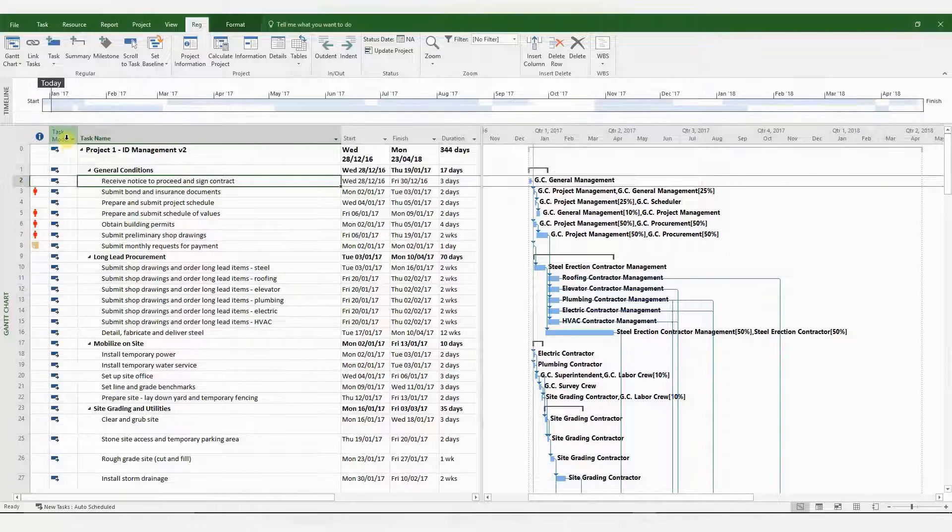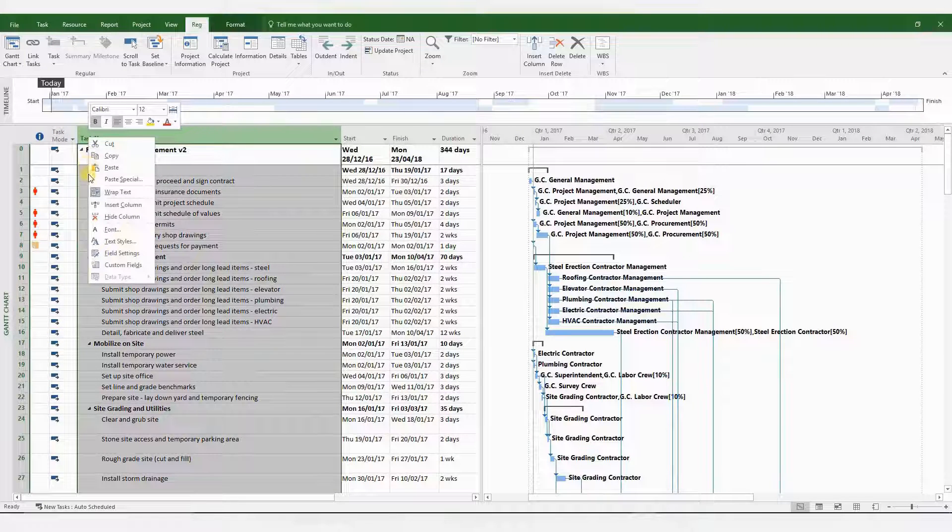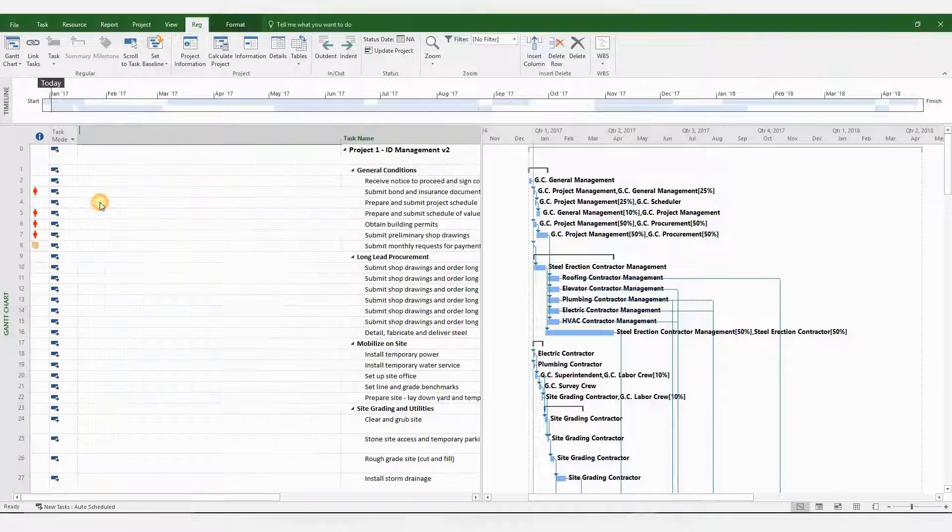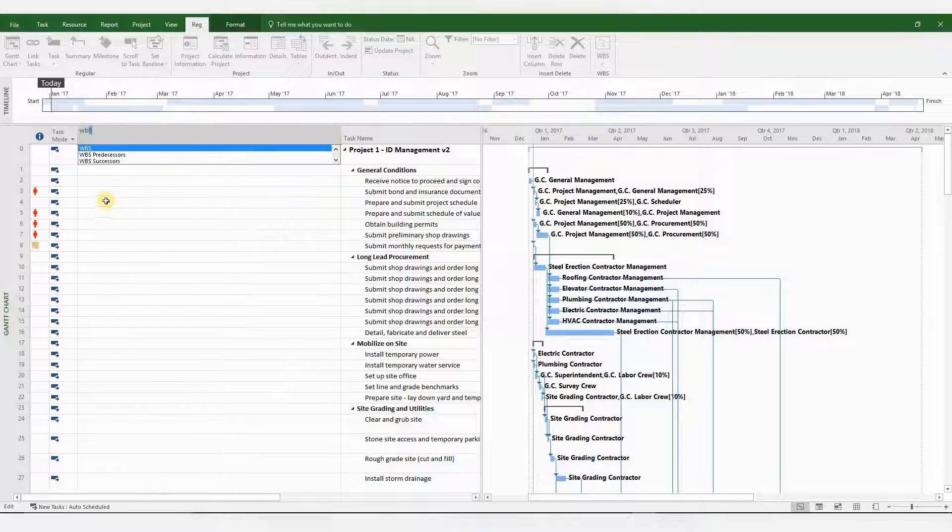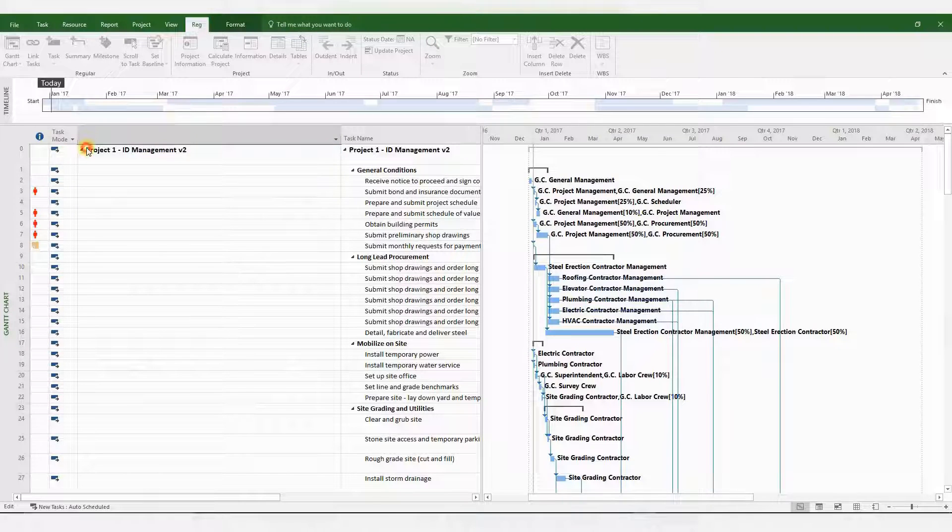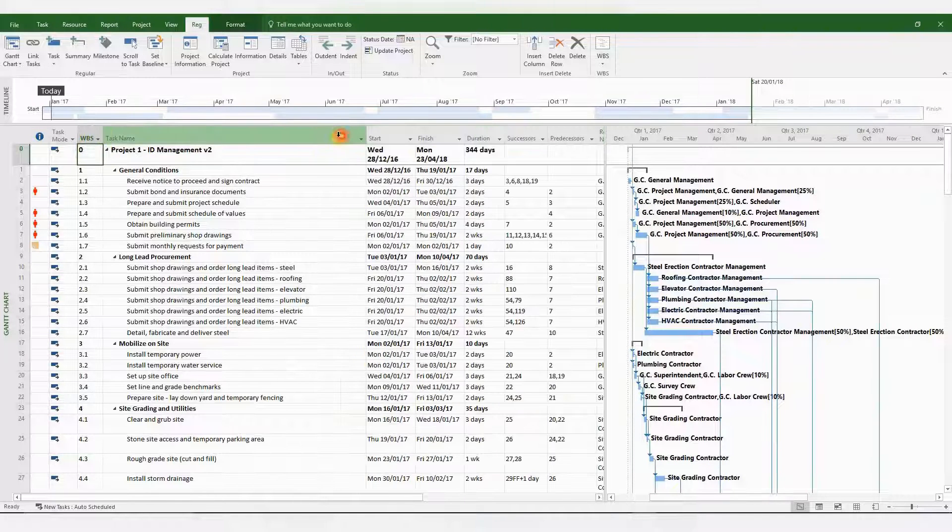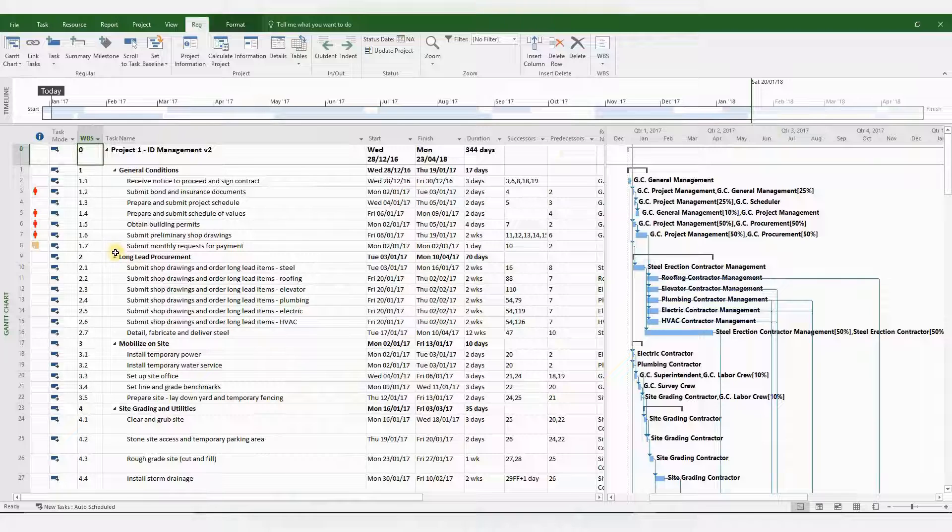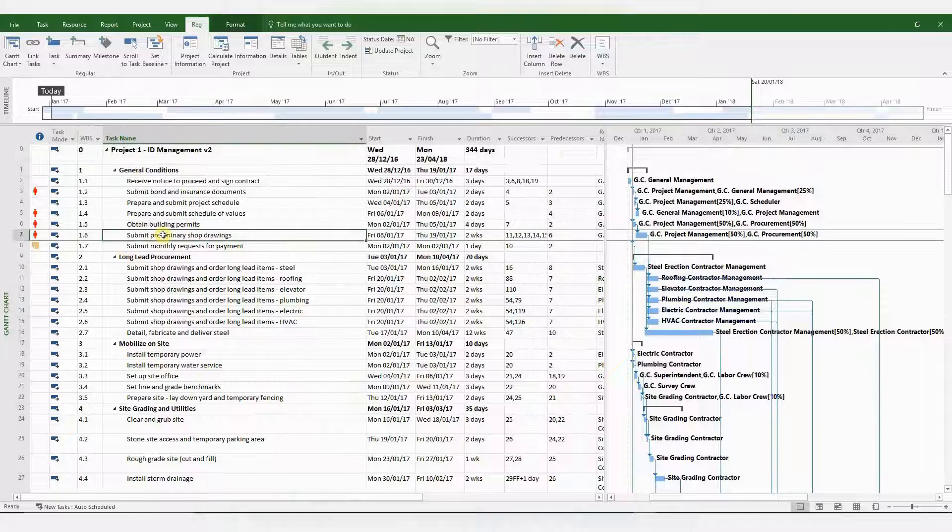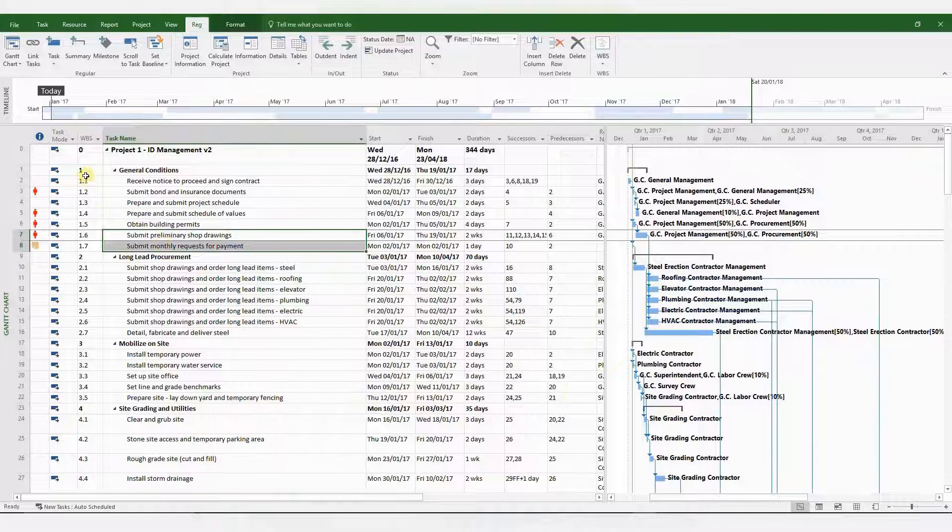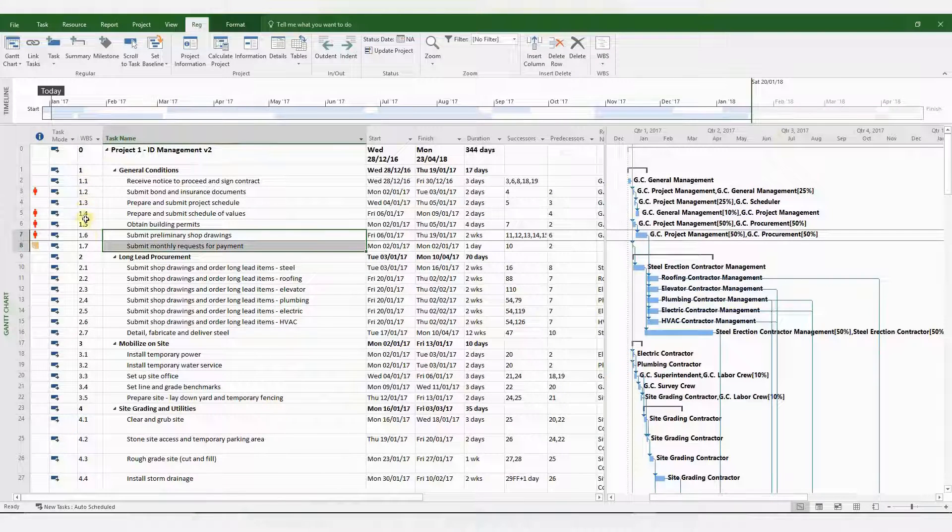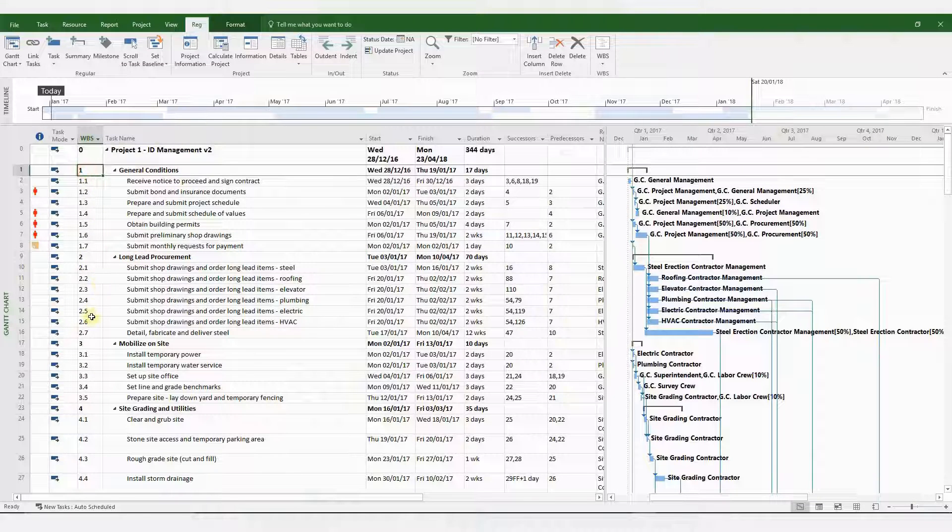In MS Project, you have to use WBS for your work breakdown structure and as a unique identifier for each activity. MS Project automatically assigns WBS codes to your activities. I've just inserted a WBS column. Please note that these codes can be modified even further.